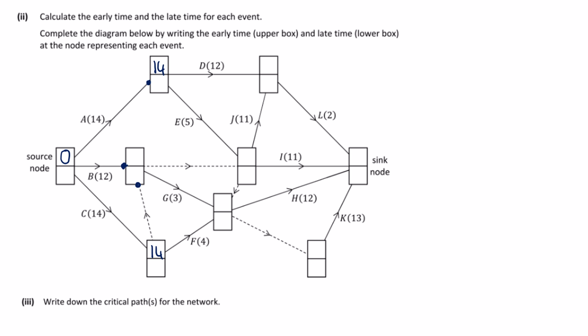So that node has B feeding into it, which is 12, or the dummy, which is 14. We always take the bigger, so that is 14. So just be careful, that dummy can throw us, and I think the direction there was tough as well. So then this node here has 2 options. We can go from G, and that will be 17, or F, which is 18. Remember, we always want to pick the...